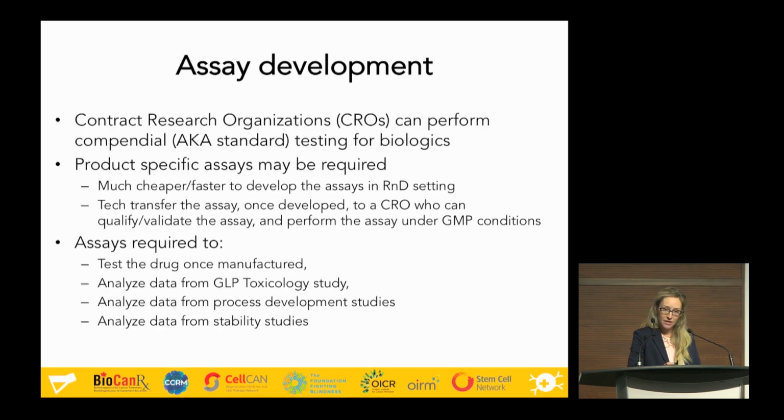Assay development is something that is largely underestimated in terms of the amount of time and money that is required. We obviously have to test our products when we manufacture them before we put them into people. There are contract research organizations that can do this for us. They will do the compendial, otherwise known as standard, testing for biologics. But sometimes, if you're making unique drugs that nobody's ever made before, you need to develop some assays yourself. Those assays don't yet exist.